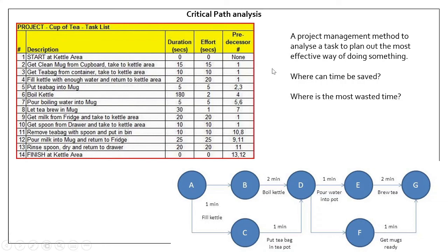So how you would map it out with a Gantt chart type thing is you'd say, okay, if you look down at the bottom here, boil the kettle, that takes 2 minutes. Okay, while that's going on, I can do these other jobs. And it's the same in industry and manufacturing. If you know certain jobs are going to take X amount of time, well, while I'm waiting for that, I can then get on with these other jobs.